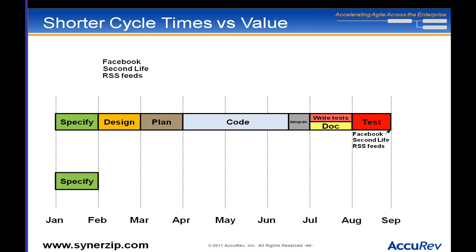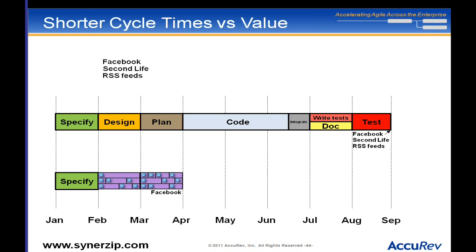Lastly, before I wrap up, let's talk about reducing cycle times, which is another way to recoup value. I have a traditional project at the top, and I'm doing an agile project with short iterations. I've got three things to do: Facebook integration, Second Life integration, and RSS feed integration. I do some stories focused on Facebook — I don't have it all yet but I have a piece of it, and I could ship this if I want to. To finish that integration I do another iteration of work.